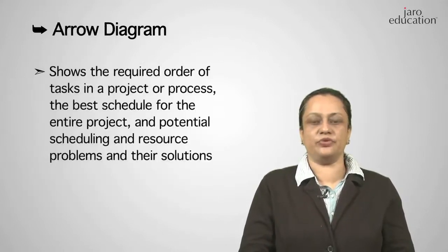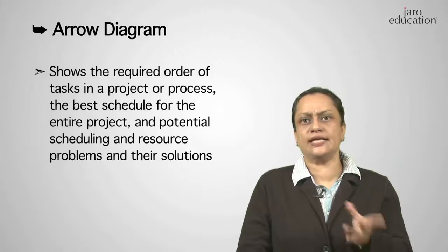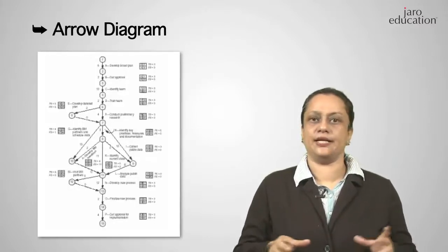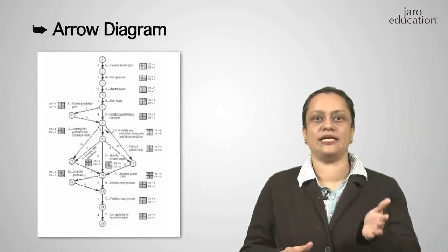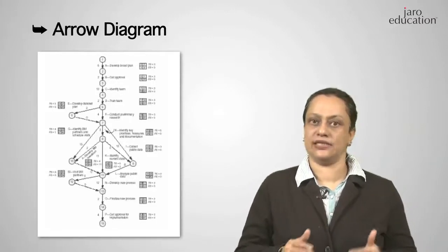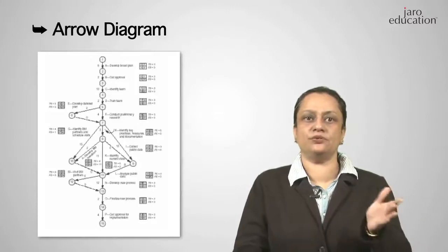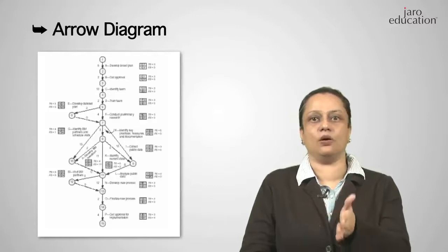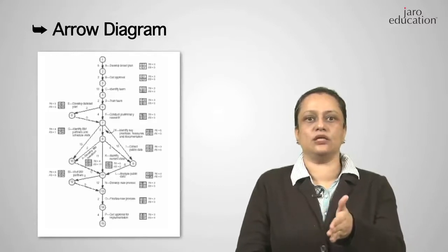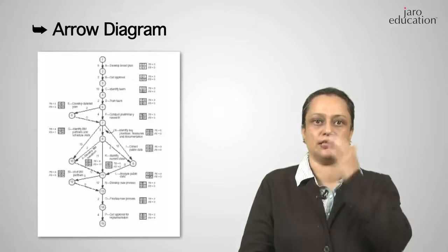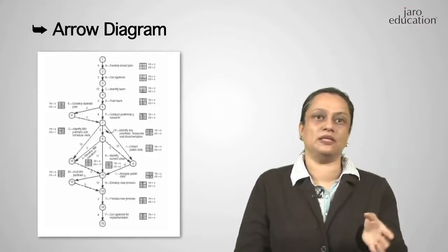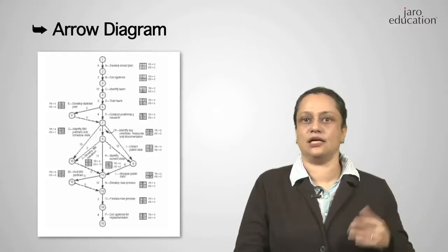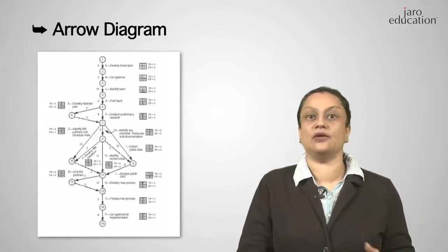There's also the arrow diagram, which you can use. This uses the critical path method. It's basically a network diagram of the tasks, and the flow is from left to right, and the concurrent tasks are vertically aligned. Between each two tasks, you draw a circle, which is the event, and the event marks the beginning or the end of the task. So the events are nodes for the separate tasks. And then using the critical path method, the CPM, you find out the critical path, the earliest start, latest start, earliest finish, latest finish, and calculate slack times.